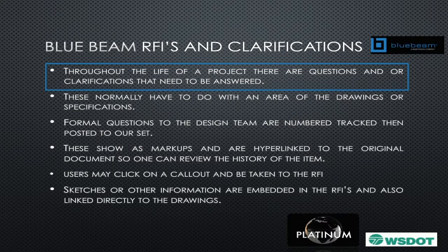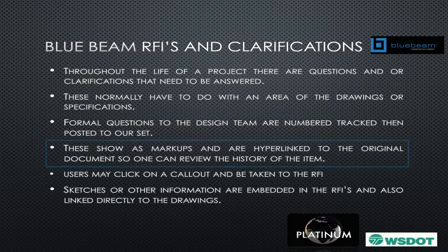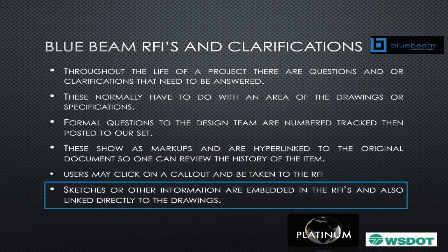So throughout the life of the project, you know, you're going to get these questions. Normally, they're focused on drawings or specifications. Formal questions are presented to the design team. They're tracked and then posted to the set. They show markups, and then they're hyperlinked to the original document. So now you can see the history instead of this little limited perspective. Users may click on a call out and be taken directly to the RFI that created this whole situation. And sketches and other information are embedded in the RFIs and also linked directly to the drawings.